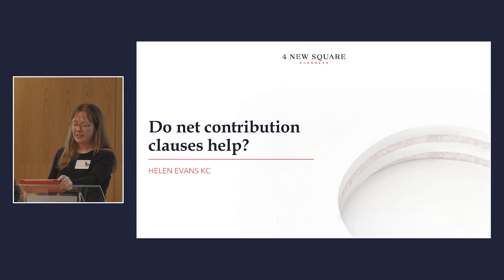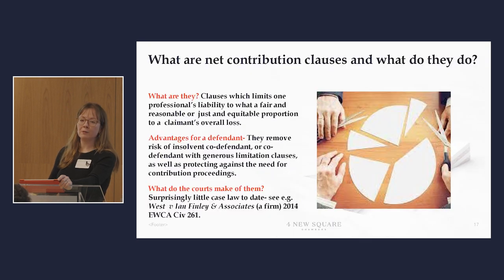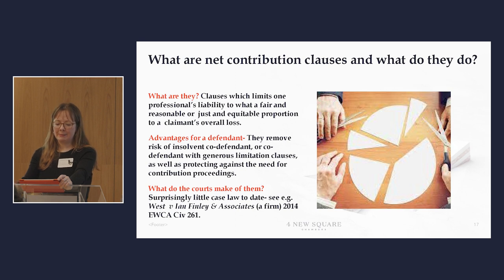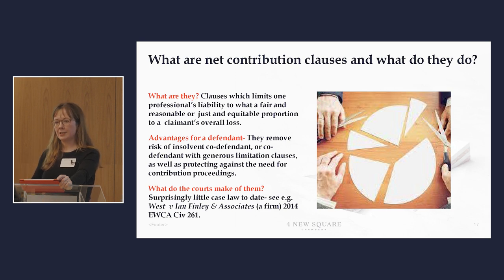So, net contribution clauses. These are also known as proportionate liability clauses, and what they set out to do is to limit a professional person's liability to a fair and reasonable or a just and equitable proportion of a claimant's overall loss. You may be wondering what's the point given that we've got the Civil Liability (Contribution) Act which does the same thing. Well the point is that they aim to reverse the starting point of joint and several liability, and they put the risk of one defendant going bust, being underinsured, or having a stringent liability clause they've managed to defend — on the claimant rather than on the co-defendants. It's quite rare that professionals get any say in the terms on which their co-professionals are advising, and you often get multi-disciplinary pieces of work — share purchase agreements or construction projects — where people can find themselves at the mercy of other people's limitation clauses.